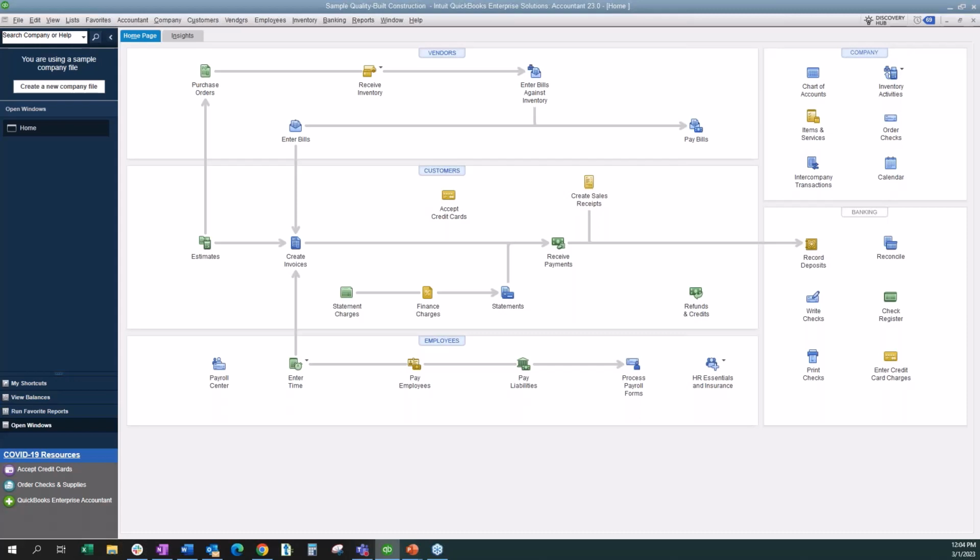So when you think of job costing, what that means is a way to track the expenses for a job or a project and compare those expenses to the revenue of the project. Entering estimates inside of QuickBooks allows you to use the full range of job cost reports, and that keeps you in line with that budget. Make sure you're staying on track. It also allows you to evaluate how accurate that estimate is, and that way it allows us, if needed, to adjust for future projects. So now let's turn it over to our accounting file.